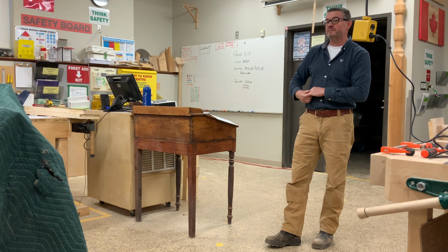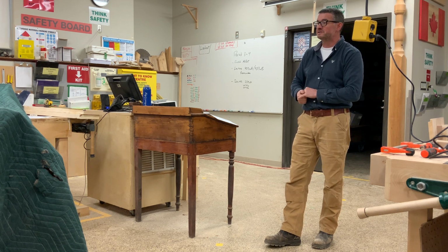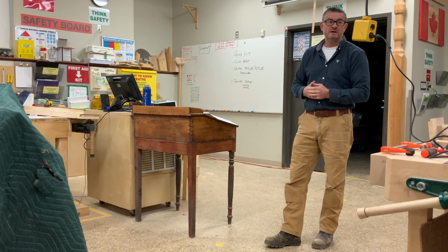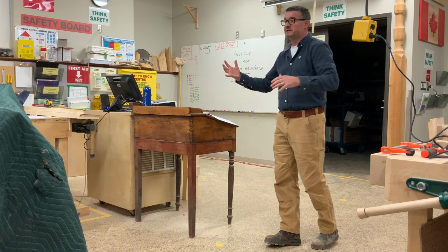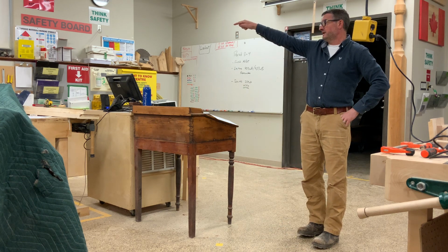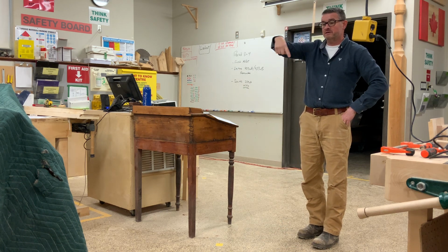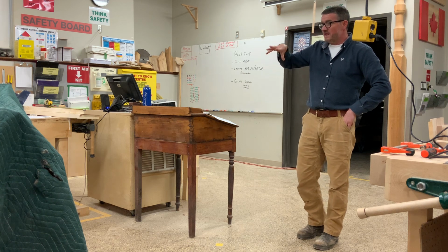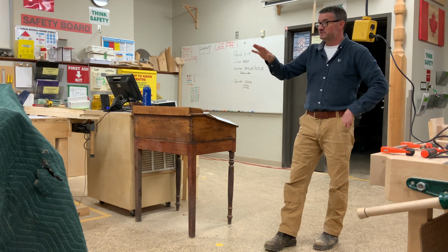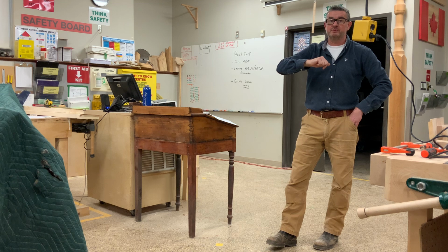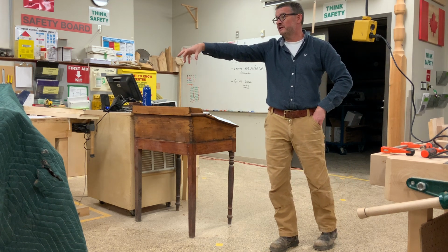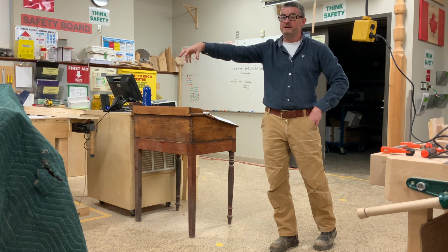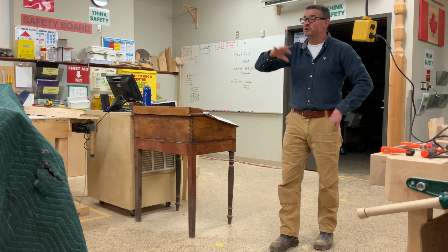Exactly. So you've probably heard the PSAs all the time: call before you dig. Have you ever heard that phrase? If you call the utility company and say, I'm going to put an addition on the outside of my house and it's going to be here, and you mark it off, they come out free of charge and say, yep, you're able to dig, no problem. Or in this corner over here, there's a problem, you're going to have to hand dig. Then, if you follow that, you're totally covered.